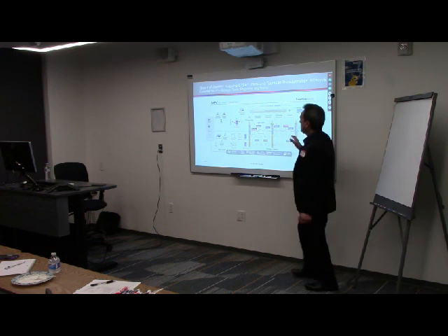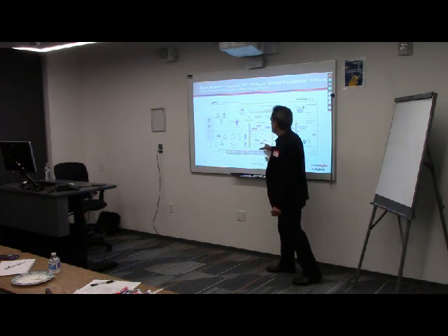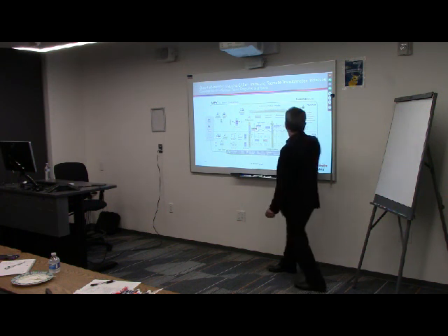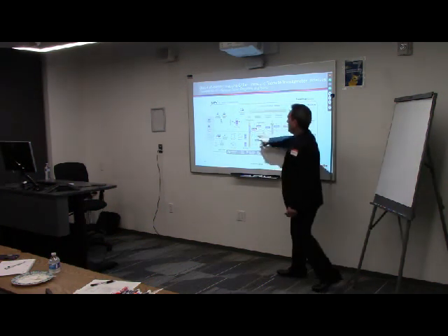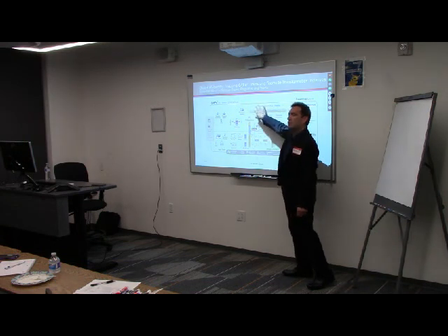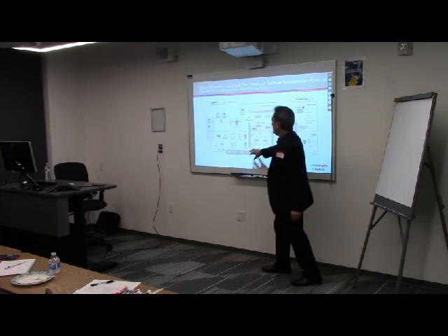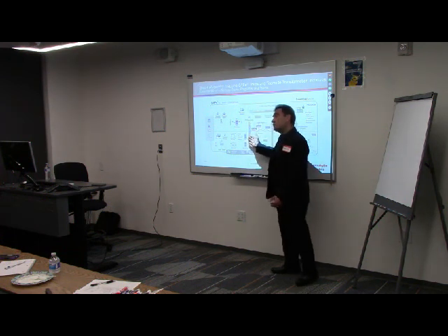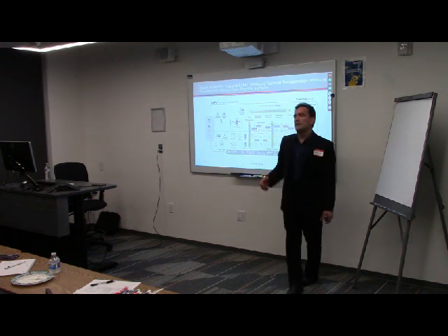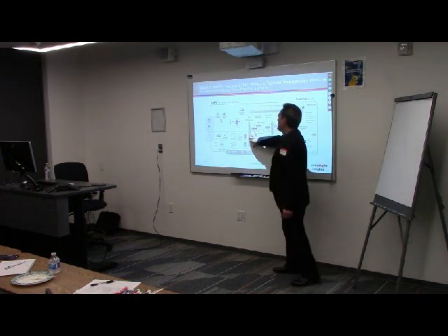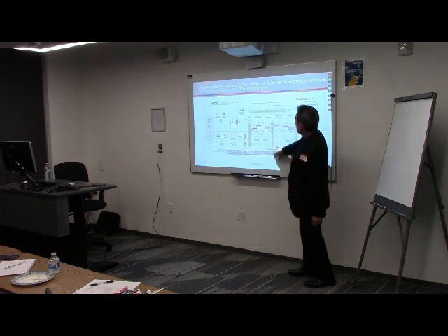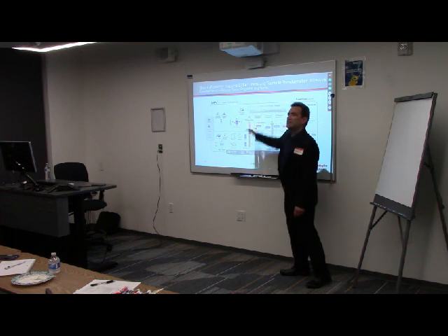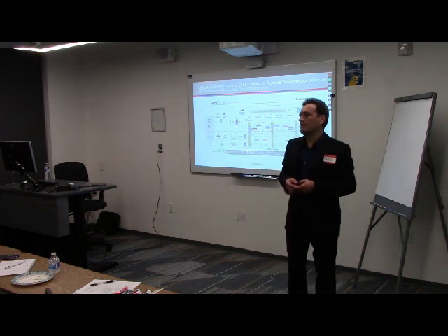So at the essential layer, you're organizing yourself to have some key concepts already in place for your teams. The ideas of team and program. So the idea is that there are multiple teams as a part of the program. That's the essential level. At this level, there's going to be basic planning going on for your program increment. Each program increment typically is 2 to 3 weeks, and there are usually 5 iterations within a program increment. At the end of each program increment, you basically do retrospectives and plan your next increment. And this goes on and on. Again, all part of an Agile release train that delivers against the value stream that you have in mind.